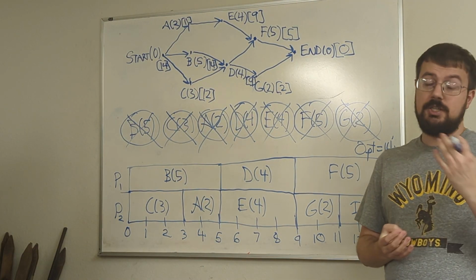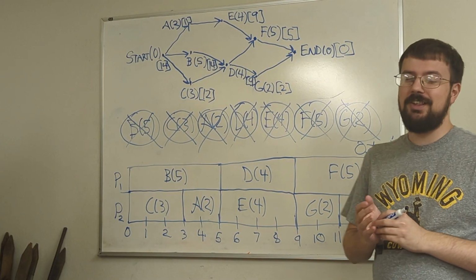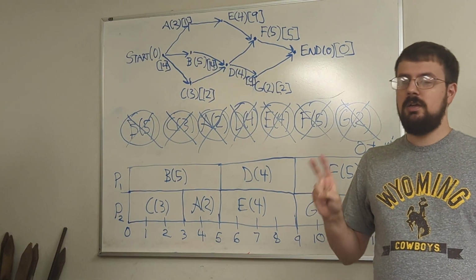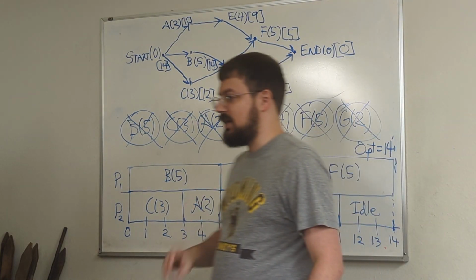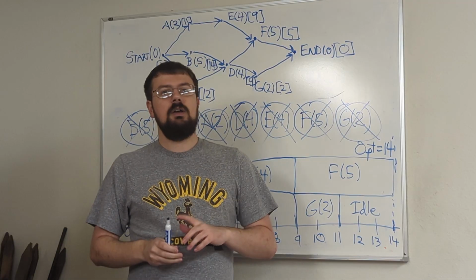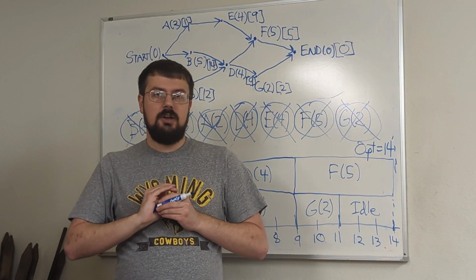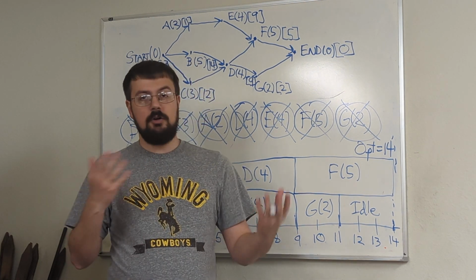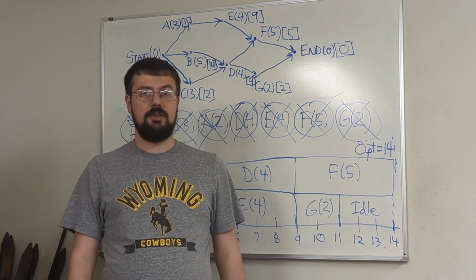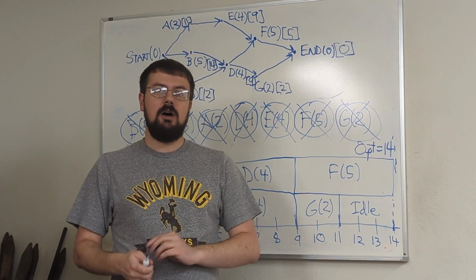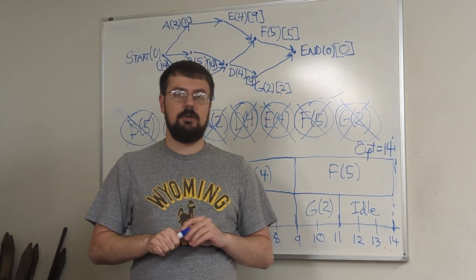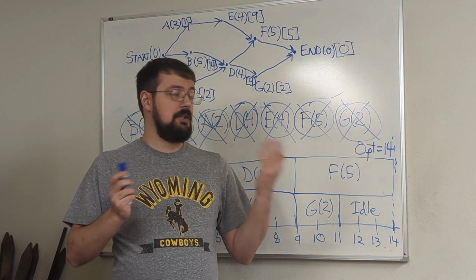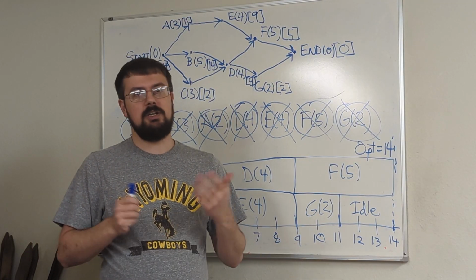Notice also, if you watched the last couple videos, that all 3 of these algorithms, simple alphabetical priority list, decreasing time, and critical path, all gave us the same finishing time for our schedule. That is not always going to be the case. In fact, most of the time, of the algorithms that we've talked about, this critical path algorithm is usually going to be the best one compared to doing a simple alphabetical priority list or the decreasing time algorithm. It just so happens that in this case they all worked out to give the same finishing time.